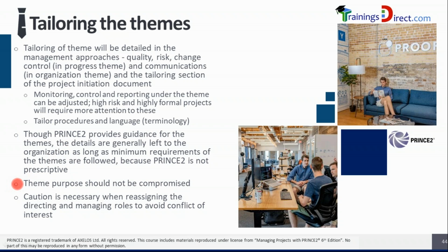Theme purpose should not be compromised. Every theme has a certain purpose, which we will see afterwards, and those purposes should not be compromised. Caution is necessary when reassigning the directing and managing roles to avoid conflicts of interest. As part of the organization theme, we will see that there is a project board role, which is a directing role, a project manager role, which is a managing role, and a team manager role, which is a delivering role.